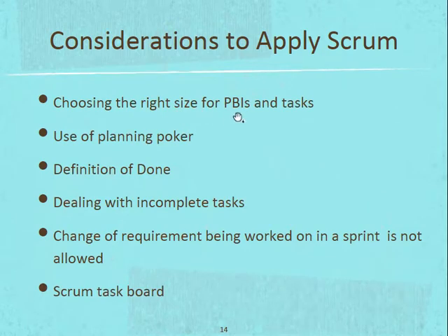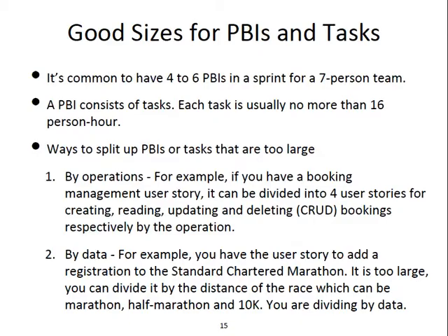When you're doing the planning, you want to have your user stories and tasks in the right size. And if a user story is too big, you can divide it up by operation. For example, let's consider an example, again using our computer booking user story. You may think computer booking can actually be quite large.